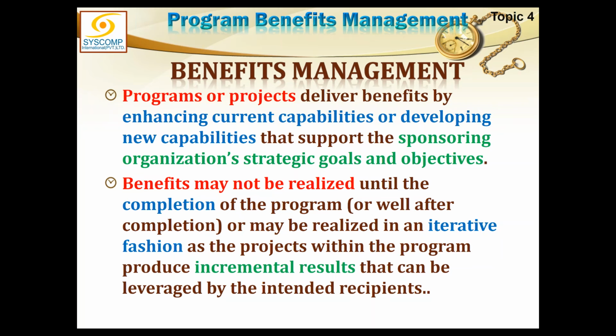in a unified way. What we can do is, if we are enhancing the education system of Pakistan, then each project may be delivering a school or a university or something like that, and we can start making them operational and they start yielding the benefits ultimately. But the ultimate completion of the benefit may occur at the end, but benefits have started delivering. So we can have incremental results coming out of it.